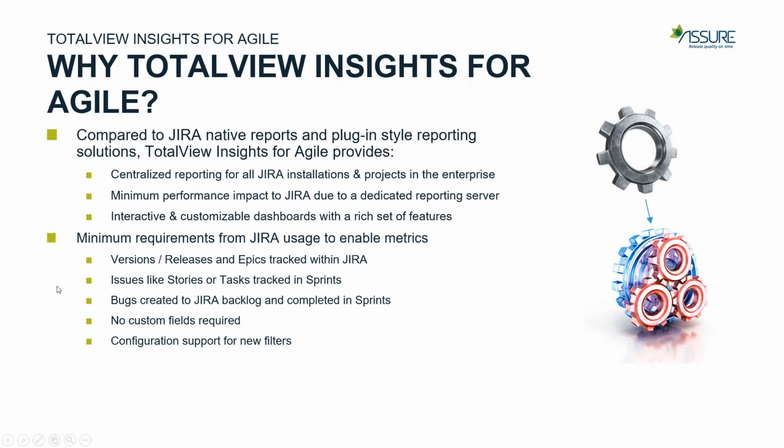Now, some people also think that bugs shouldn't be created unless they are leaked from one release to another. But what we think is very important is to also report bugs within one project or one release. You don't necessarily have to do a whole story points estimation and jump through all the hoops with bugs. But at least if you can put the bugs into Jira and add them in the sprints for solving, this is one of the prerequisites that we like to see in Jira usage.